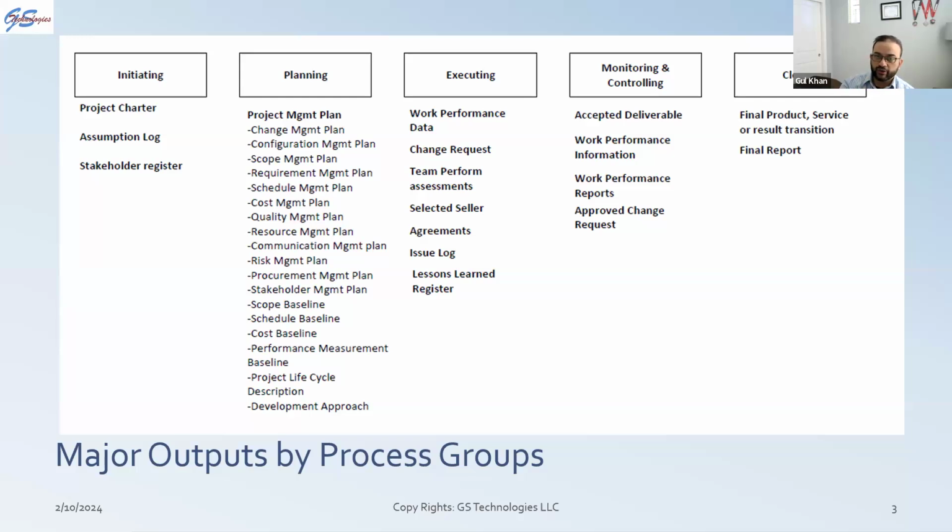So you will go into that one, but it is imperative that you document that this is a change. Never ever just override the previous one with the new one, because if you do that, you will lose what was our baseline where we started. So you need to have a baseline always there, and then you add that change and make sure that the next time I open the document and want to see what was there, I should be able to see that this was the original thing and this is the change that we had introduced. So now this is the latest one, and we go from there.